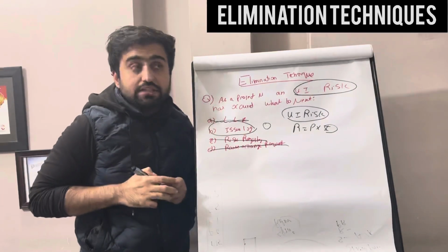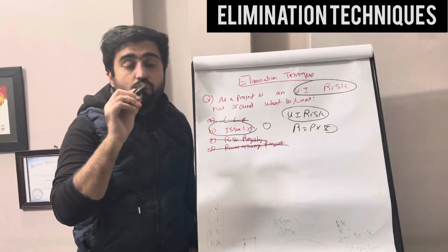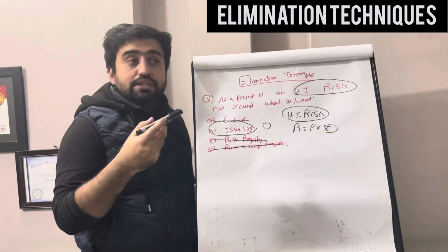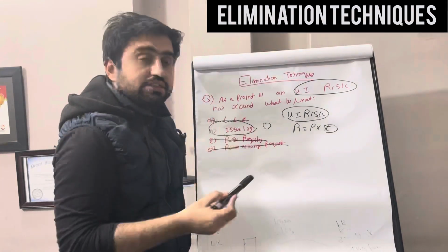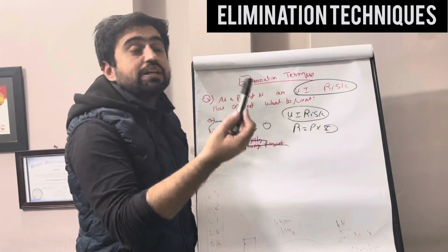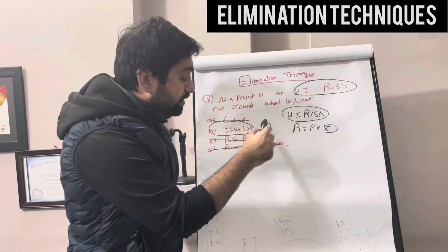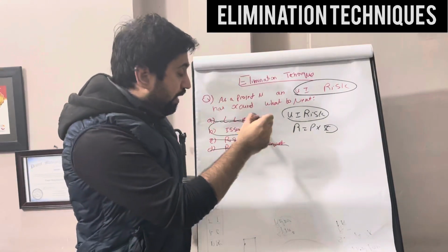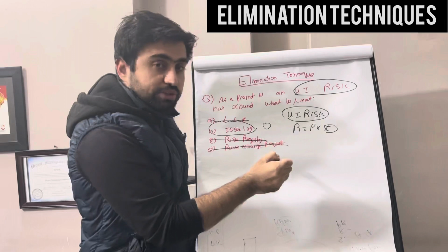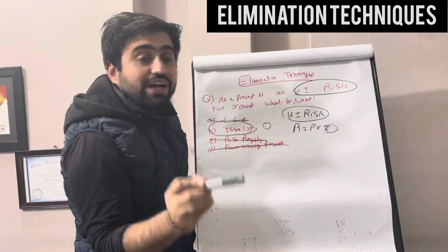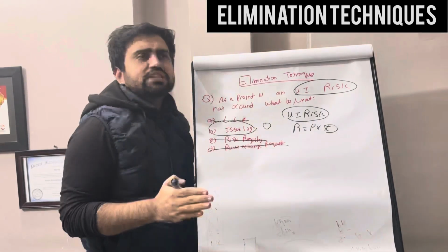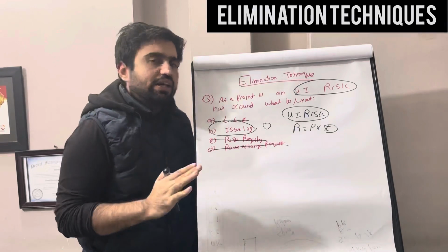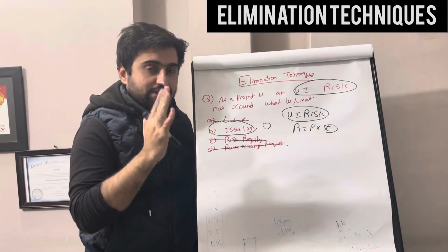So as a lesson, you know that whenever an identified risk occurs, you update the risk register. When an unidentified risk occurs, you update the issue log. But you used the elimination technique. You went through one option at a time and explained why it is the wrong answer. Use this technique and I am sure you can answer most of the PMP questions. Thank you very much.